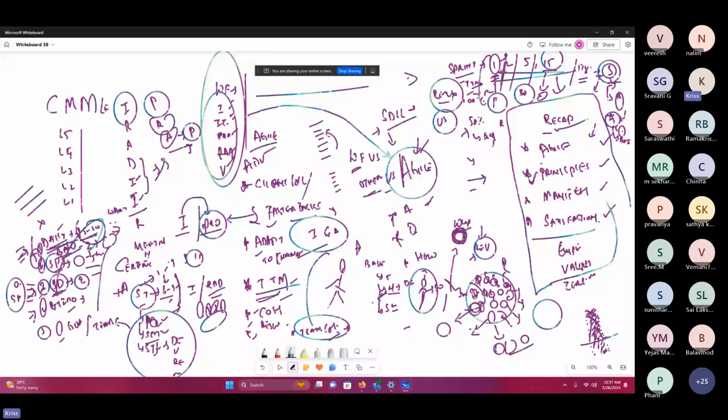So these all come as sprint one, sprint two, sprint three, and so on. There is another terminology called sprint zero. Sprint zero is a prerequisite where you make the preparations. All prep activities go into this sprint zero. This is how the sprint numbering comes about.